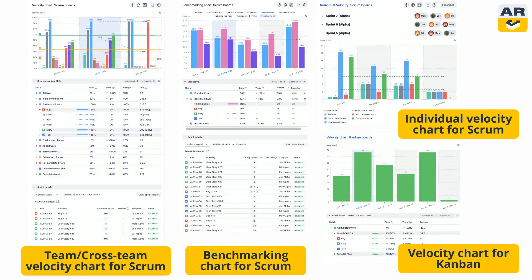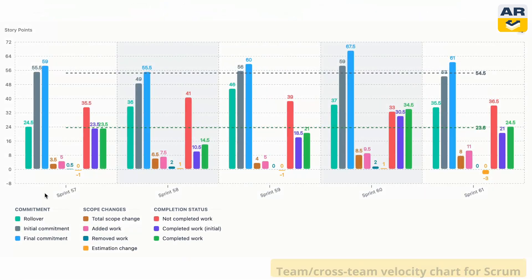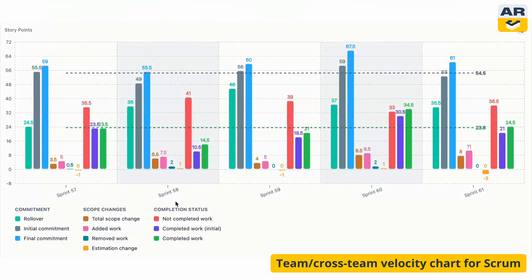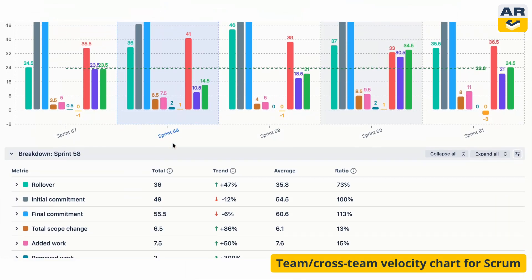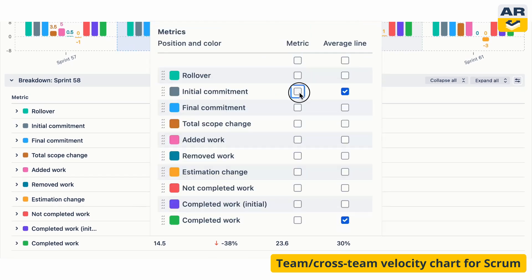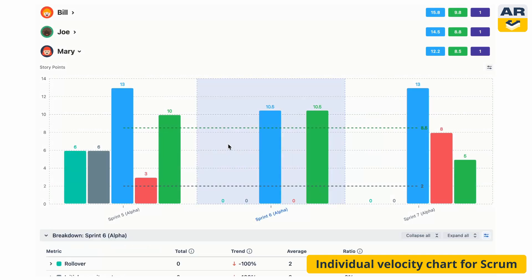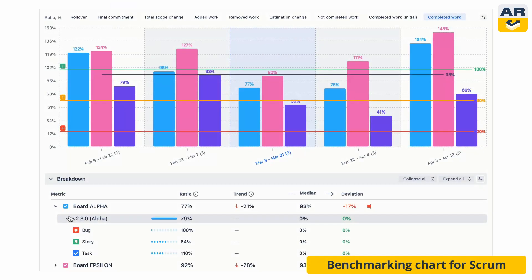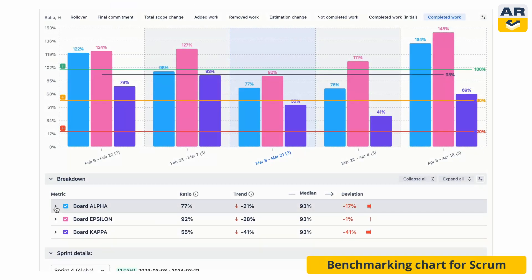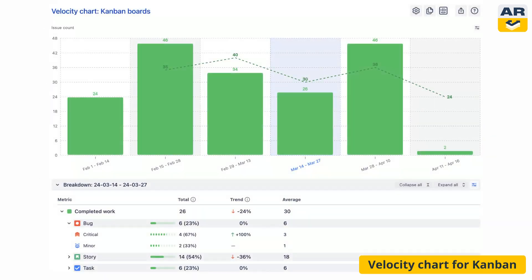Now let's see what charts this app has to offer. There is a set of velocity charts to examine every detail of your sprints on the JIRA dashboard. For Scrum teams, the velocity charts show 10 key sprint metrics based on commitment, scope changes, and completion — pick which metrics and averages matter most to you in the settings. Use the individual velocity chart to see how each team member helps in a sprint, or flip the view to see sprints grouped by user. The benchmarking chart lets you see how different teams stack up against your benchmarks. And if you're running Kanban, there's a dedicated chart with all the same detailed analytics.